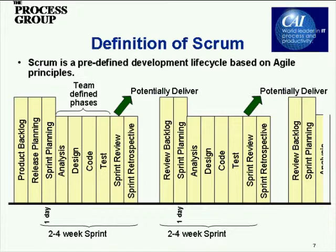Slide 7 is a quick definition of Scrum for people that are unfamiliar. It starts on the far left with something called the product backlog, which is essentially a requirements list. If you had requirements — typically called user stories in the Scrum or Agile world — they are one-line sentences describing from an end-user perspective what the system should do. For example, 'As an end user, I would like to access this data in this format.' By breaking down system functionality into user-centric one-line items, you build up what is called a product backlog.